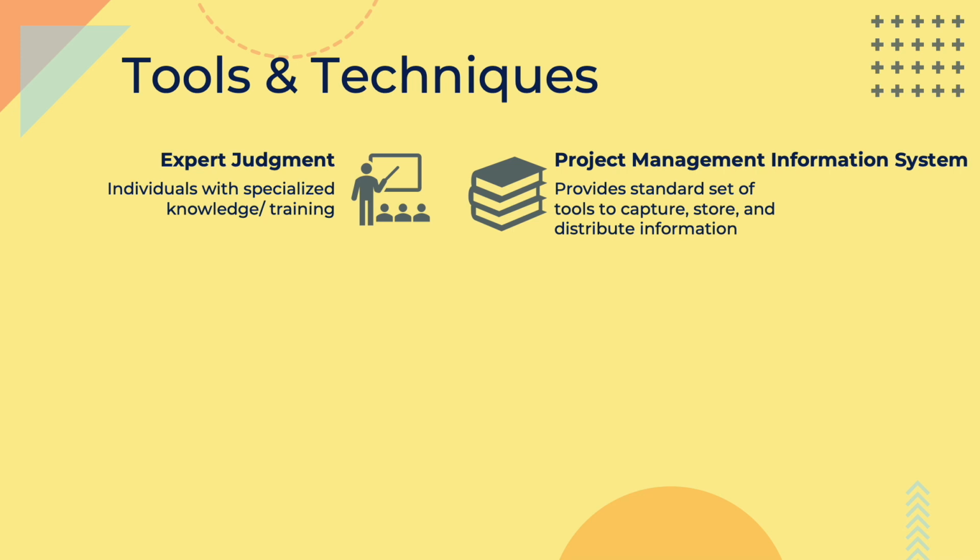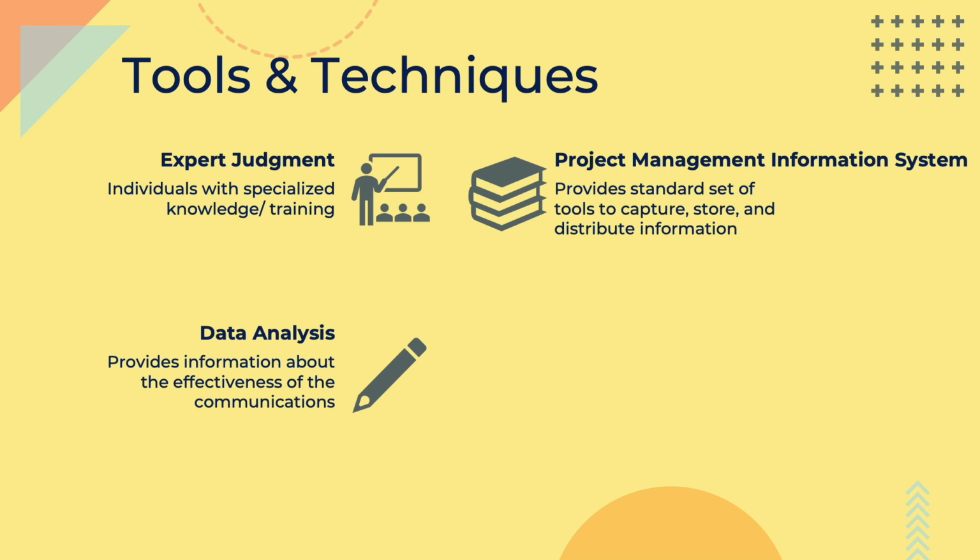This information in the system is monitored to assess its validity and effectiveness. Data analysis provides information about the effectiveness of the communication activities and can be achieved by reviewing change between desired and current engagement and adjusting the communication as required.